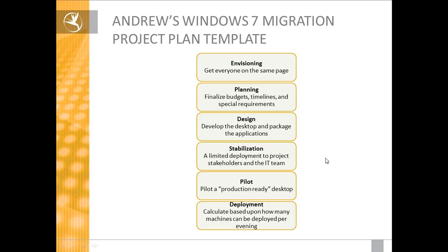Then obviously time for the design, which is the desktop image, the desktop deployment process, and then the packaging of the applications. Applications, if you're going to package them in-house, you need to get a real sense from the internal folks of how many that they can do, and if they're going to be dedicated or not dedicated to it. Application packaging to be successful is something that a person needs to sit down and not be bothered while they're doing it. It takes focus and it's just something to keep in mind.